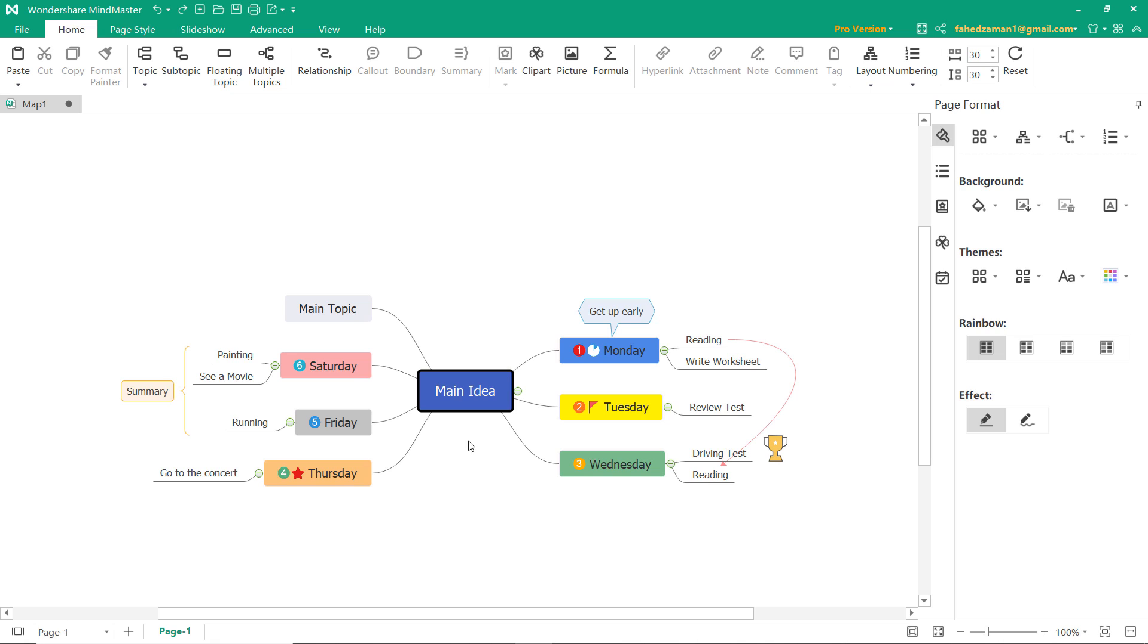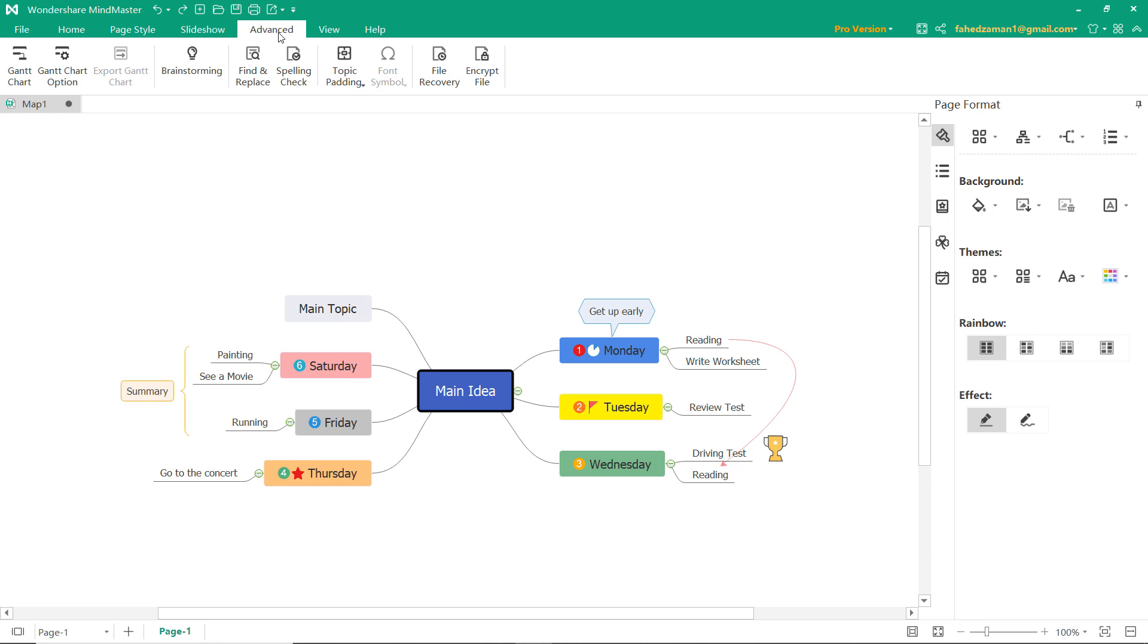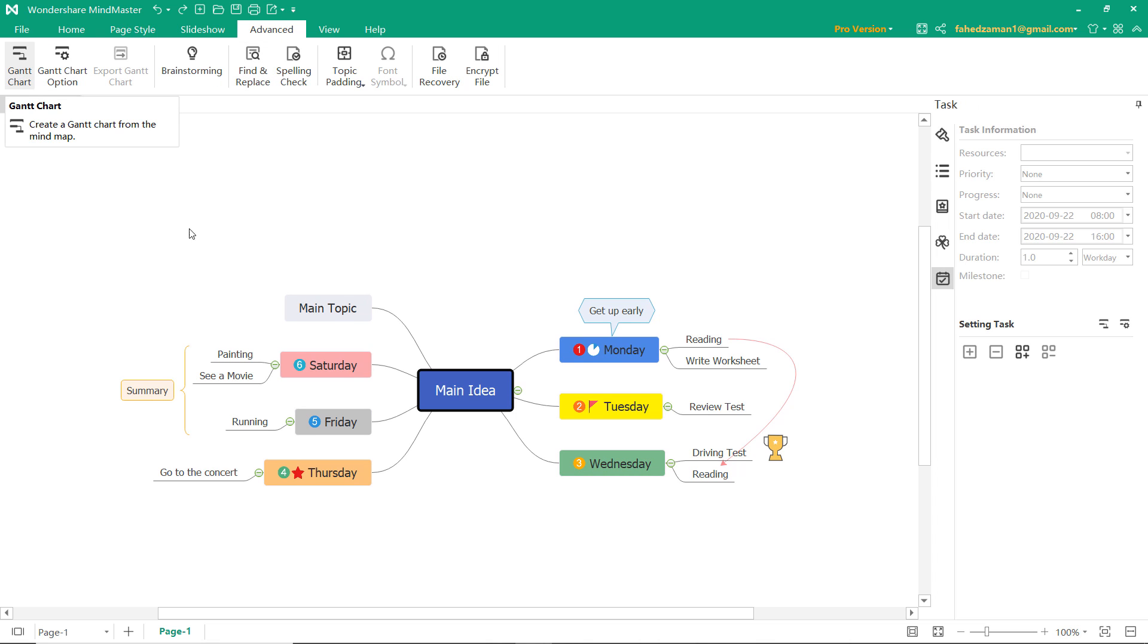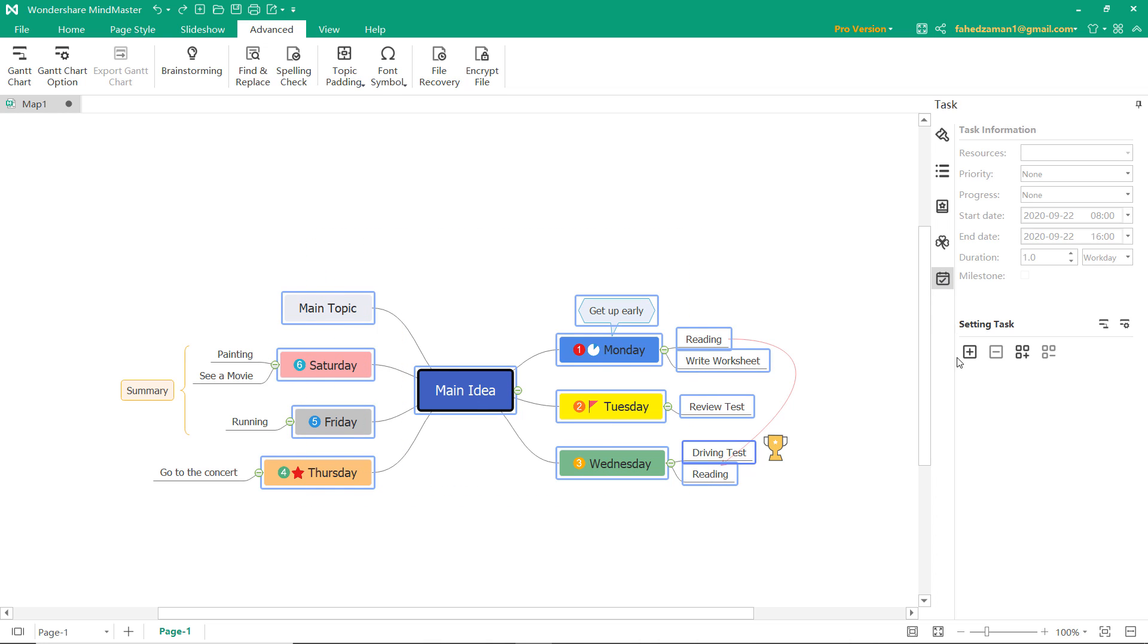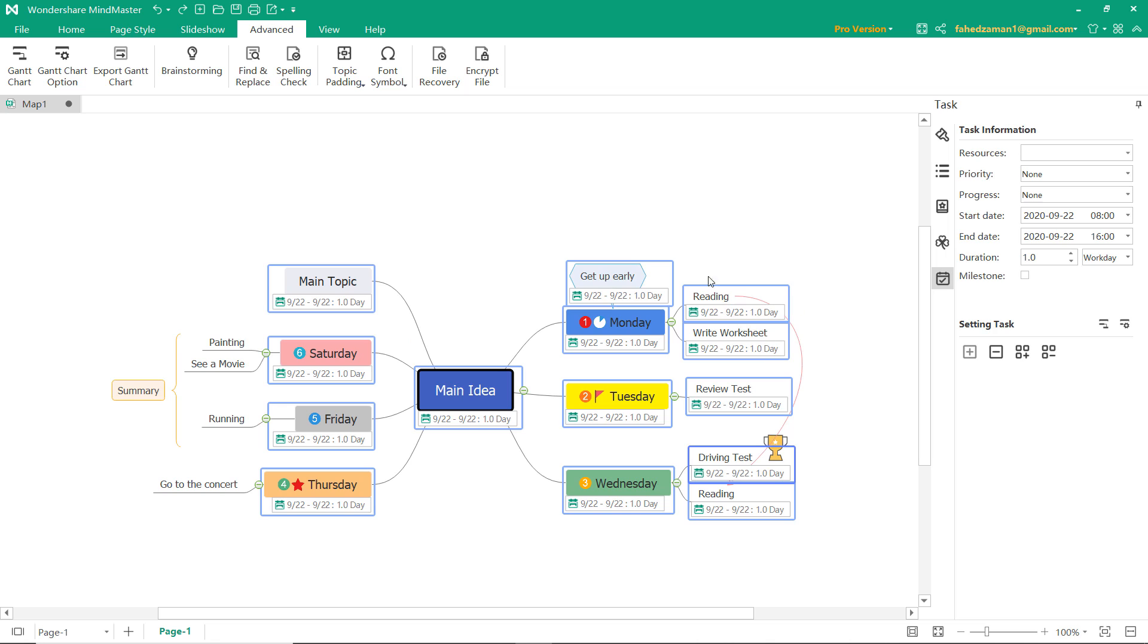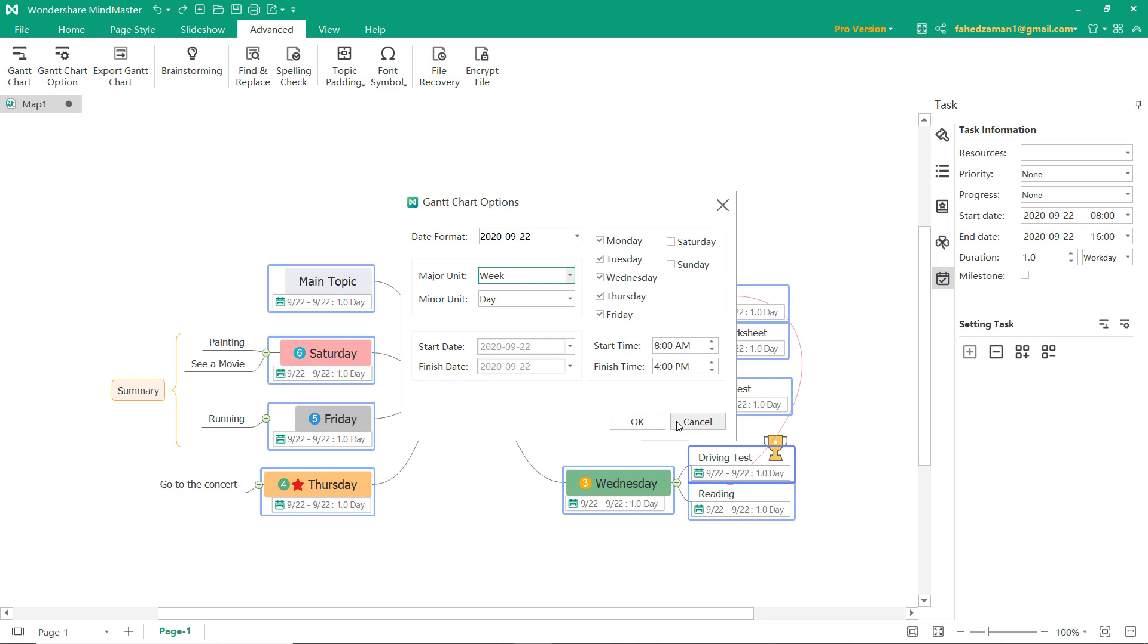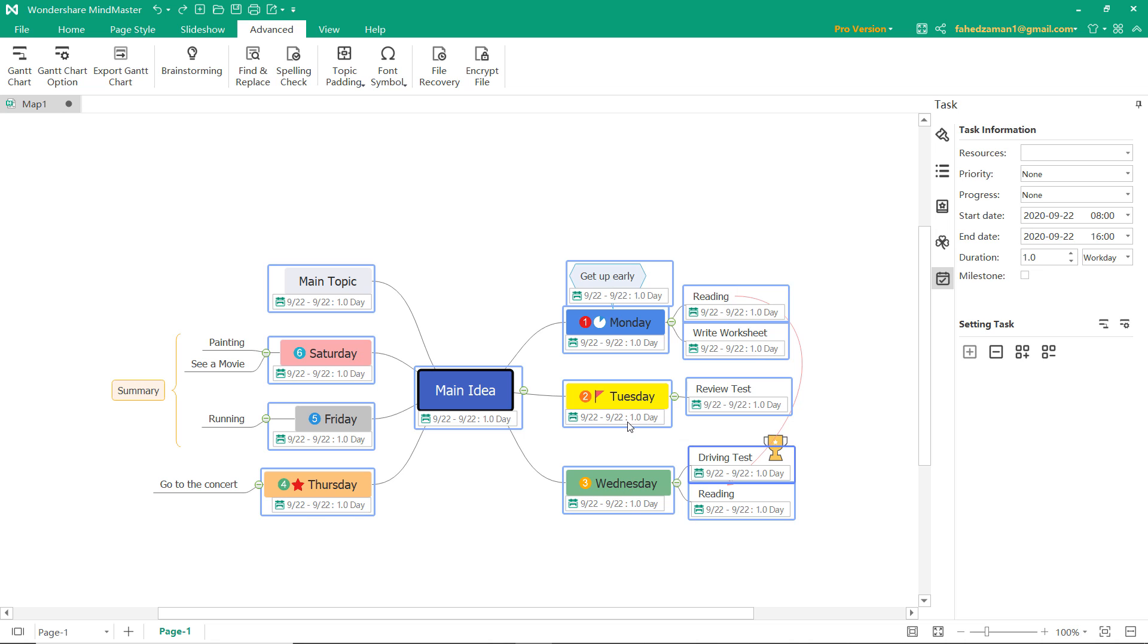Preparing Gantt charts from mind maps is quite easy in MindMaster. Go to the advanced tab and then click on Gantt chart. Select all the topics of mind map and then click on add task information. You can see all our mind maps topics are now listed into Gantt charts. Using Gantt chart options, you can format a few things like the date chart, units, whether to include weekends onto your chart, and define the time frames. Once your Gantt chart is ready, you can easily export it into PDF format.